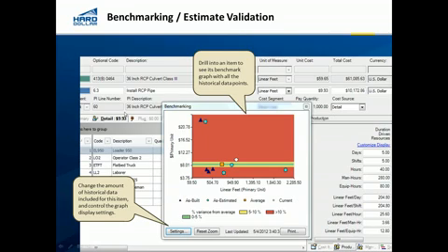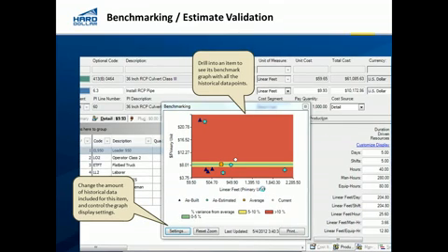In Hard Dollar's world, everything on the CBS level, the work breakdown structure, is extremely finite and detailed in terms of the level of detail it would go down to. Each item that you see there is built up, or can be built up, from resources, equipment, and material that drive that item. All of that data can be correlated and interlaced into the schedule, which you can see here on the right-hand side where we see days. So Hard Dollar creates that triangle of taking scope, schedule, and cost and ties it all together. And this is a pretty good screen that depicts how that detail comes to fruition all in one place.